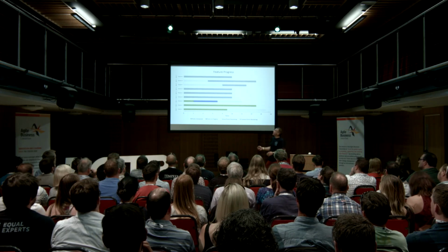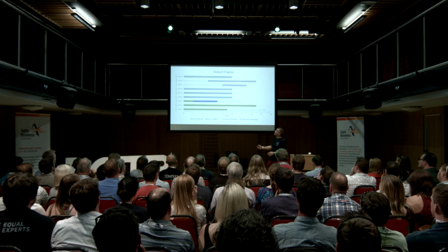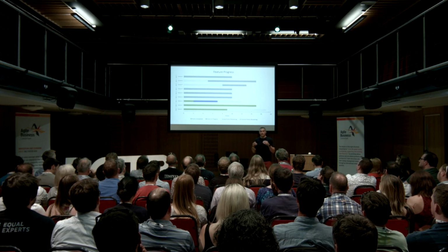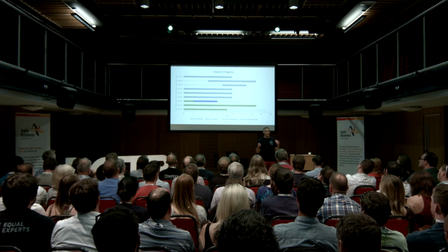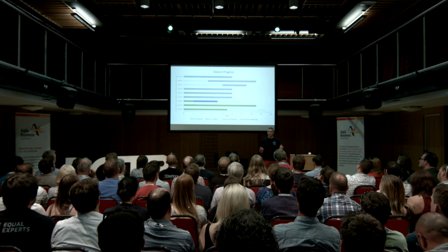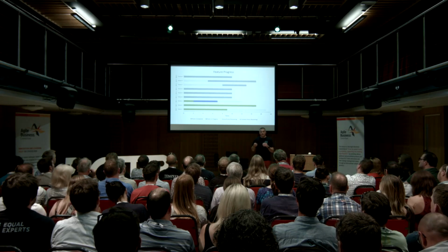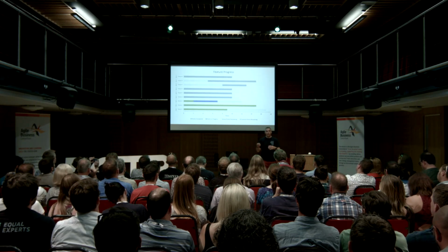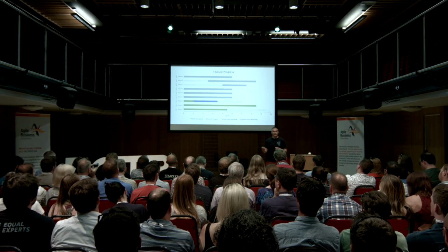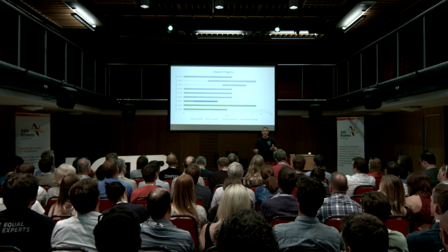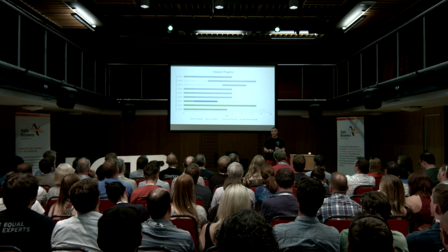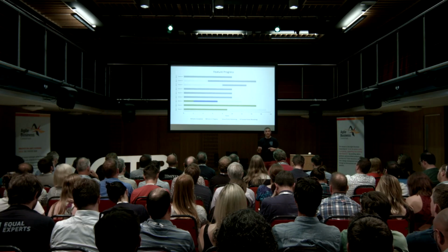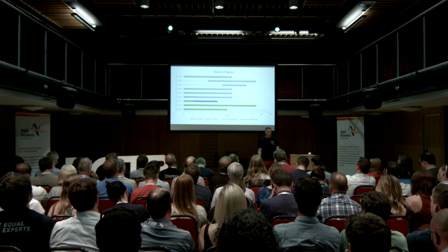And that's interesting when you look at feature 8, it's actually jumped up quite a lot here. So in this example, there's a lot of unknown. This straight away gives you a visual representation of how much unknown you actually have in your backlog. So you can start to use that to help you have discussions with product owners or with the team generally, just to start to work out what we do about that. It might not be a problem, it might just be something that we're expecting, or it might be highlighting an issue where you haven't broken down enough work in the backlog.